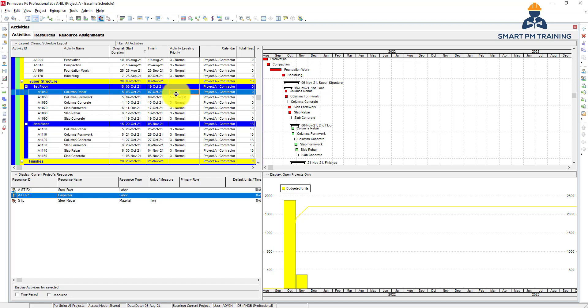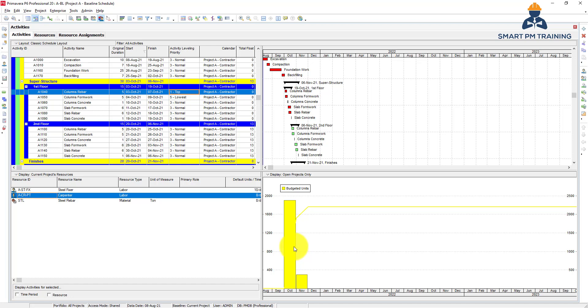I want the lowest priority for carpenters, but for rebar, I want the least amount of demand over peak periods. Don't ask me to afford 30 qualified steel rebar fixers now - I want you to tell me not 30 laborers but maybe 20 laborers over a two-month period. This is the whole idea of leveling - it will take some of them from here and put them here.